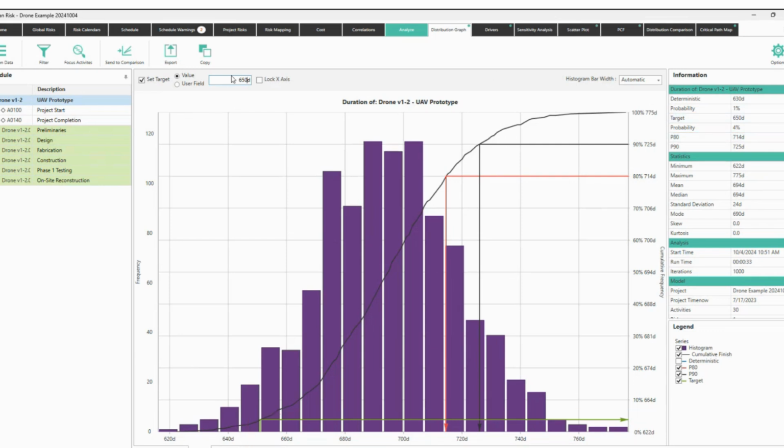What's the nice thing about the QRA, quantitative risk analysis? I can say, let's negotiate and let's go to 690 days. Of course, they will like something in exchange, but at least now you have 44% probability of making it happen. It's not the best scenario, but at least you win like 40 days and say, look, we're going to have a month and a half of delay.